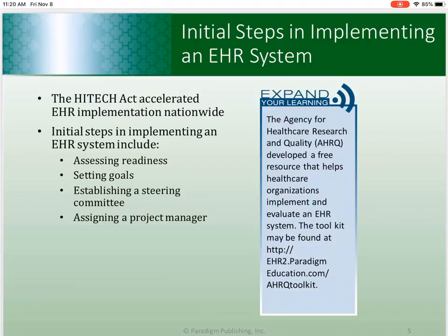When we implemented an EHR system at North Mississippi Medical Center, we really, truly did start meeting at least a year before the implementation date. And that was just strictly from the HIM side. What documents needed to be sent to our document imaging system for the legal health record storage. What pieces of information or what data elements needed to be in each document. Because again, we were the experts in which document had to have what information. So they came to us and we planned and we planned and we planned. We had at least every other week meetings until implementation, and then we continued to meet afterwards. So again, planning is absolutely critical to implementing your EHR system.